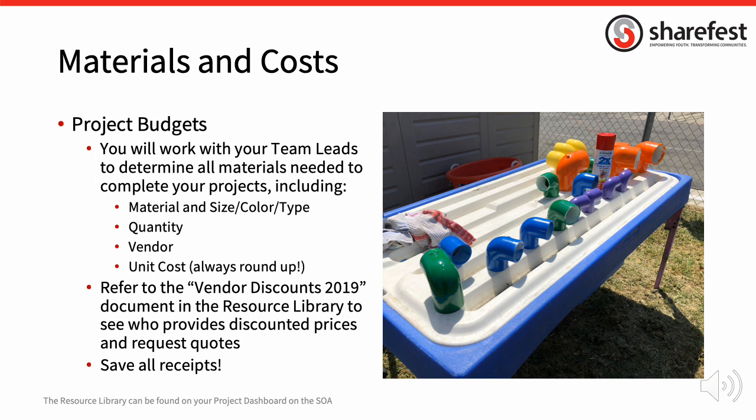You will need to put together a detailed budget for your project. This means thinking through every aspect of your activities and researching what each material will cost. Always round up, and it's always smart to add $500 or 10% of your project budget costs to buffer for incidentals. If you don't believe your organization has enough funding to support your entire project, you may submit a detailed budget to ShareFest for assistance. We received unassigned sponsorships that support the Workday as a whole, and we will do our best to support your project's needs. These budgets are due no later than April 1st.